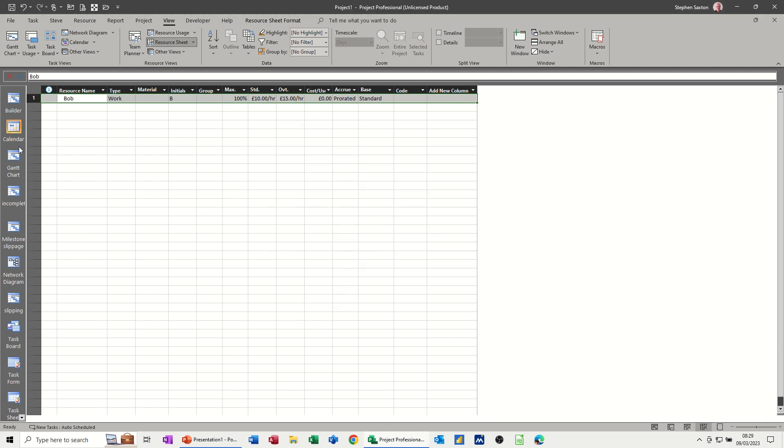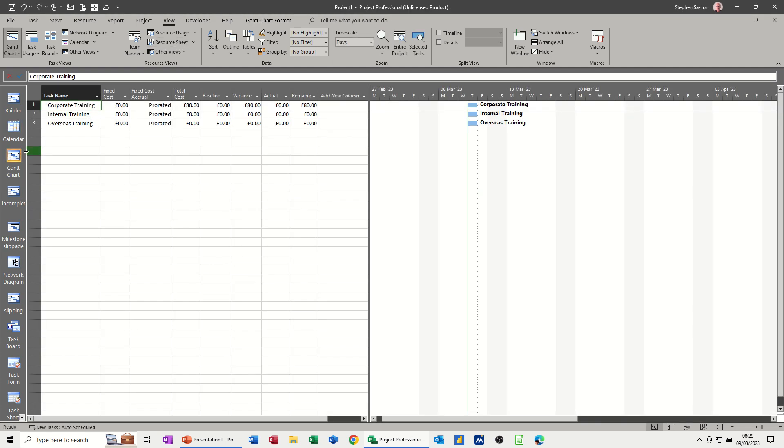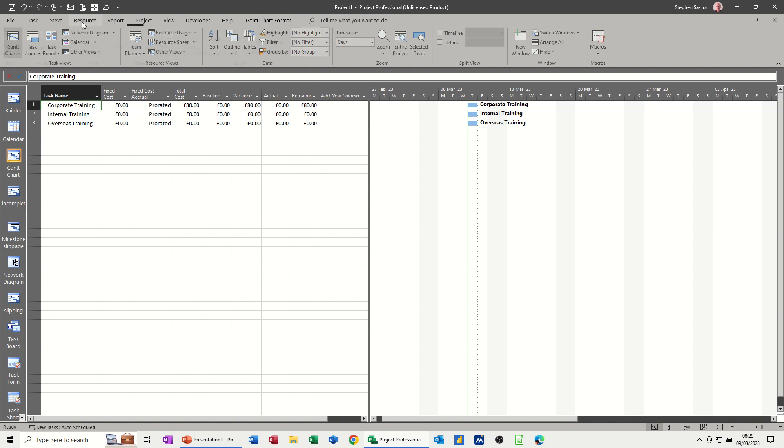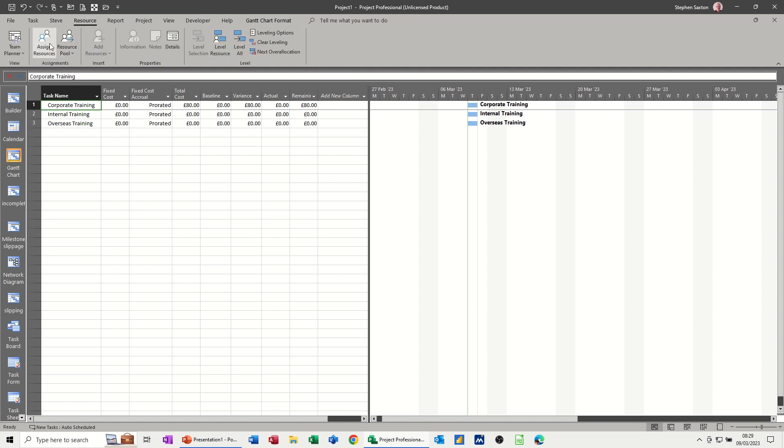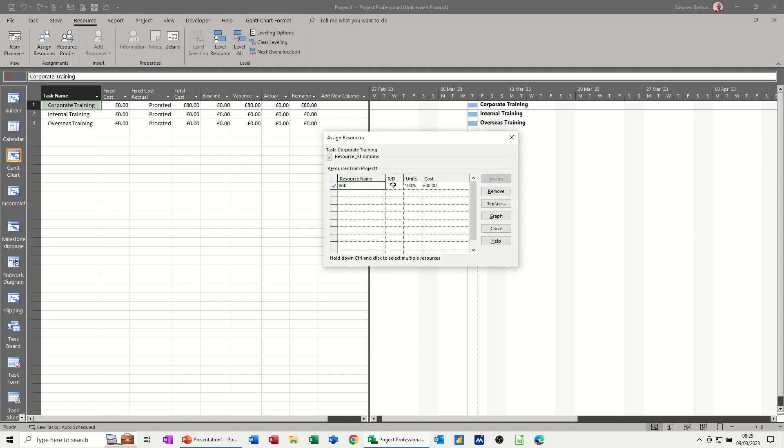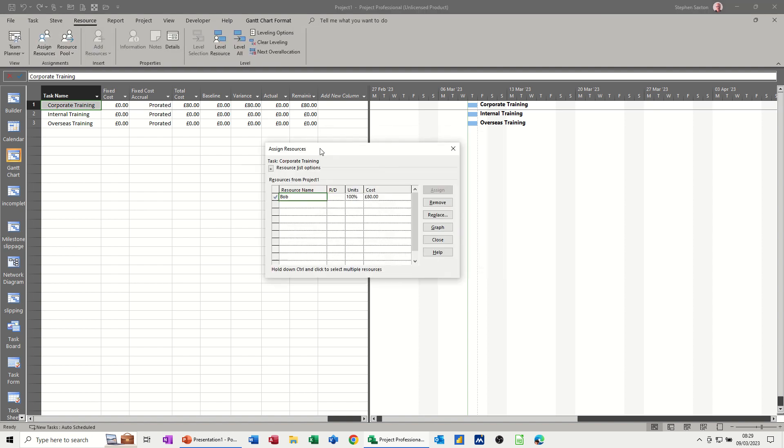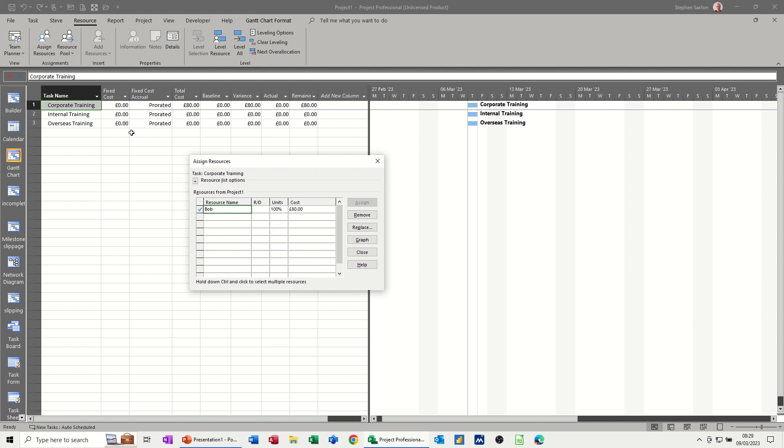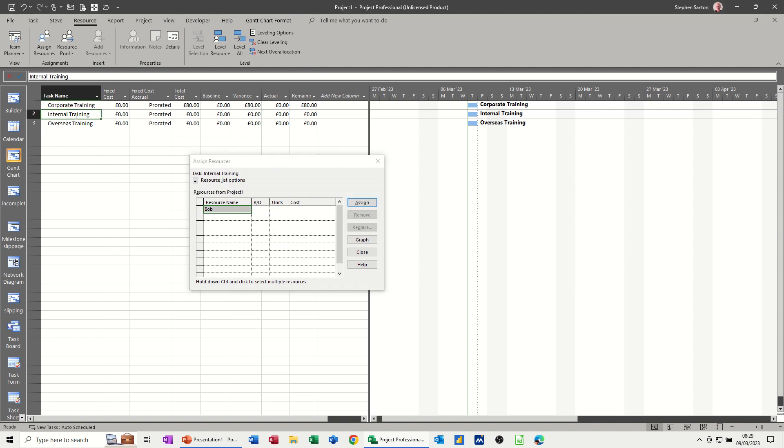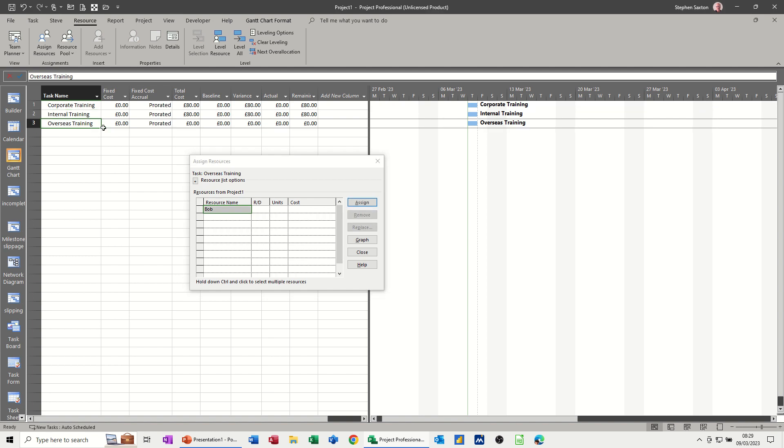Now if I go back to the Gantt chart and click on resources again and assign resources, if I put Bob on internal training, he's getting the default 80. If I put him on overseas training, he's getting the default 80. So how do I change it so he gets the other cost sheets?